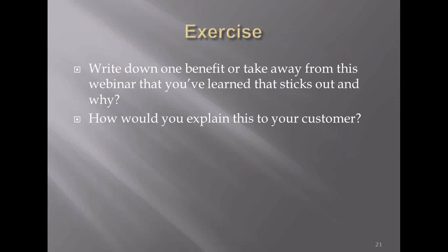They typically will have a profile report on the contractor, their name, their address, their company, some references, things like that. They may even ask for some financial statements. They'll ask for the general liability insurance and any workman's comp, and a filled out W-9 form, and then obviously their bid, and then they'll make that determination if the contractor has the proper credentials. So next question is, who decides who the contractor is going to be?